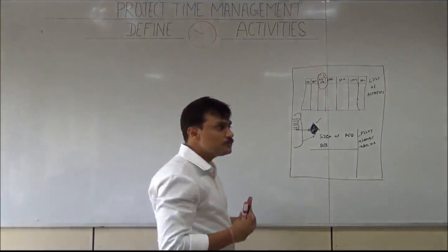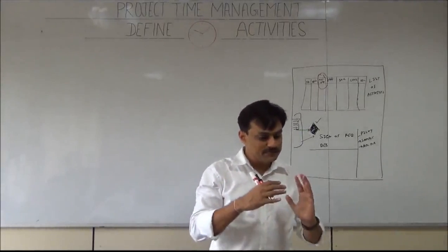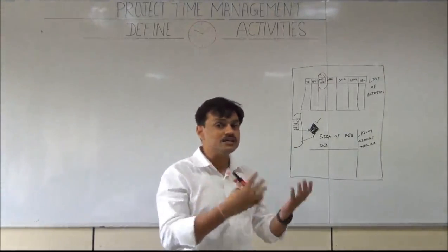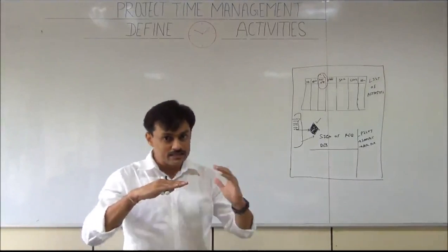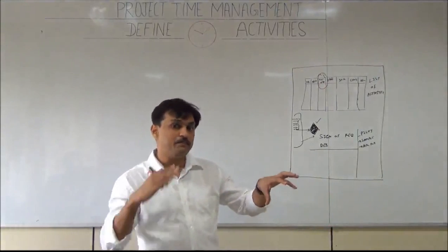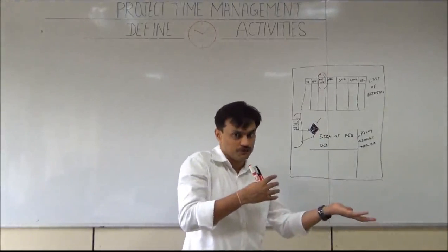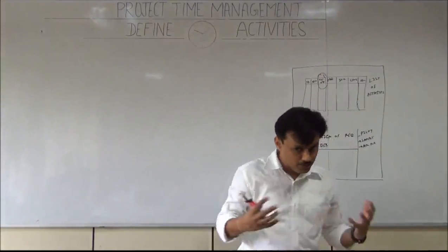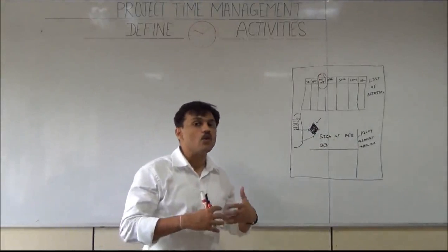Apportioned effort activities do not produce the output directly, but they ensure that discrete effort is going in the right direction, such as quality assurance and quality control. Apportioned effort activities are dependent on discrete effort activities. So we cannot have only apportioned effort activity, because it would not produce any output; it needs input from a discrete effort. The third type of activities is level of effort.